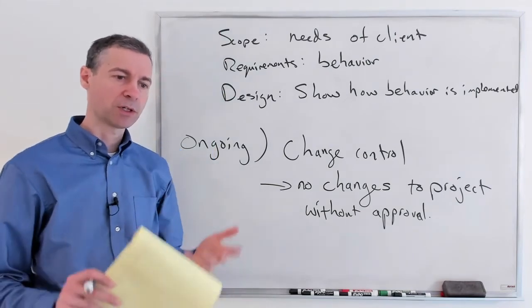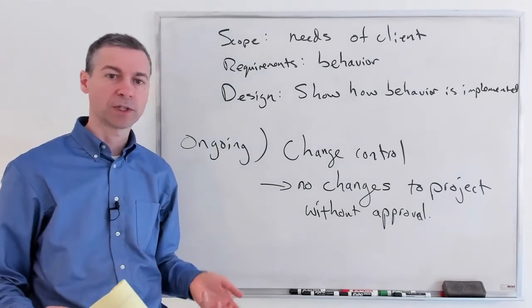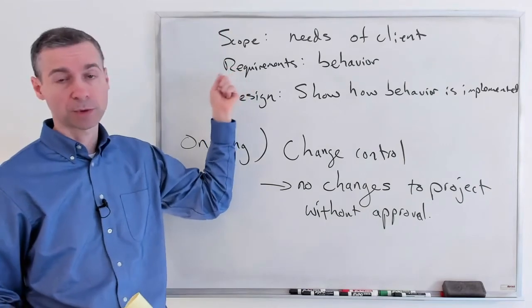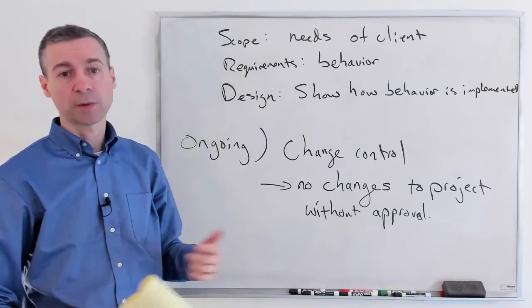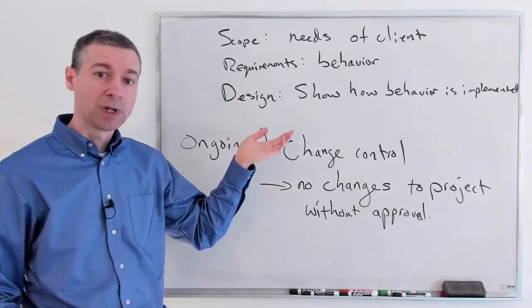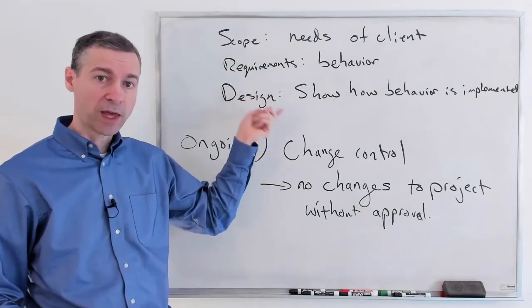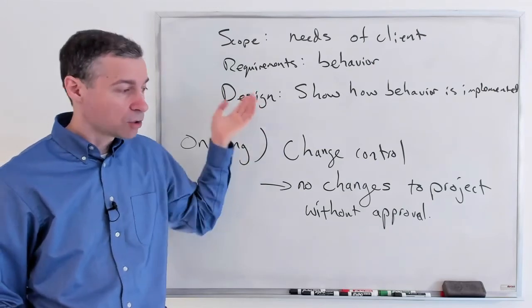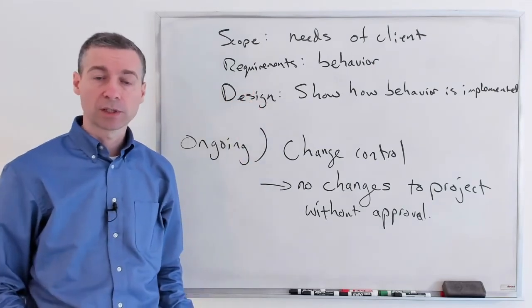And so the first part, oh, we agree to work further and we'll pay you to write the software requirement specification. And then you spend all this time to write it and they pay you for it. And then based upon that, which they sign off on, you begin work on the rest of the project.